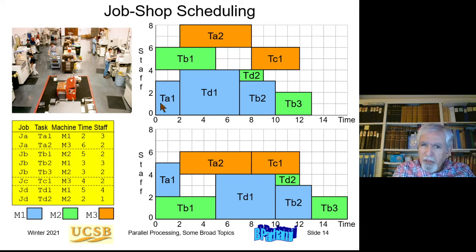More people, shorter time. Fewer people, longer time. And then you may decide that the product of these two, 6 times 16, which is 96, versus 8 times 13, which is 104, is your criterion. Now, putting these tiles next to each other, you also have to make sure that constraints are satisfied.